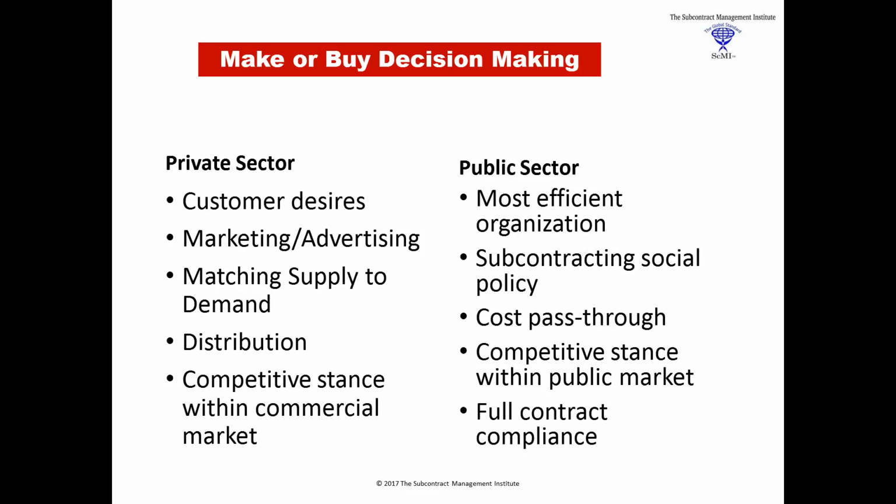And if you put all these clauses in, contractors will do it. Think of yourself as the prime, and the government says, hey, we're going to add a clause. You say, okay, great, and here's the cost. And when they add a clause, you get additional cost, and your subs are entitled to the same thing. So you don't stack all of that in there. But you also have the issue, for example, of property rights. For example, if you contract with a sub and the data you request from the sub is less than what the prime contract requires, you're going to have to go back to that sub and buy more rights. And trust me, they ain't going to be cheap at that point in time.